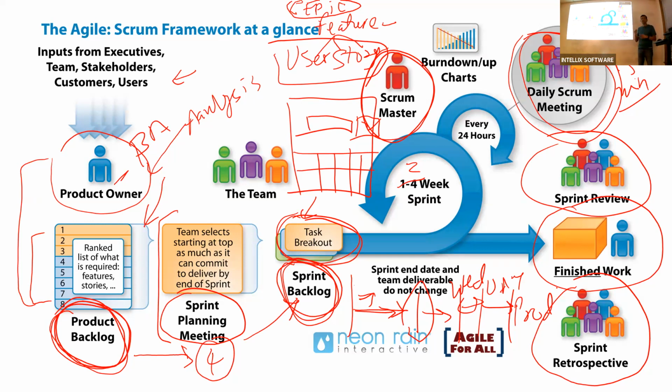And the stakeholder might say, oh, we don't like this part, let's change it up, or let's add another story to improve it. The search, the way it's working is fine, but I think we missed one piece of functionality. Maybe we want to search not on last name, first name, but add search on something else as well. So they will create a user story and put it in the product backlog.